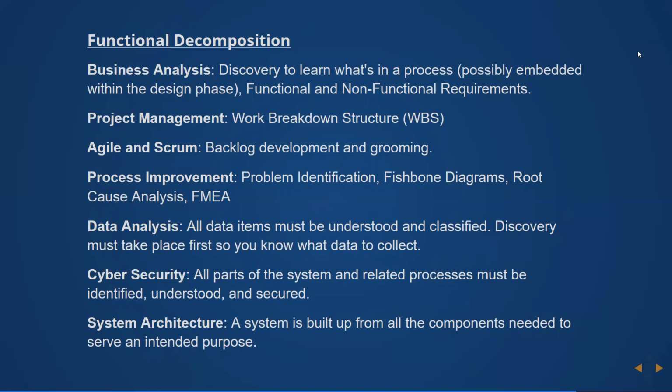You may do discovery as part of the design phase if you're building a whole new system from scratch. In project management, you basically break things down from the top and make a giant outline with everything you can think of that you're going to have to address.